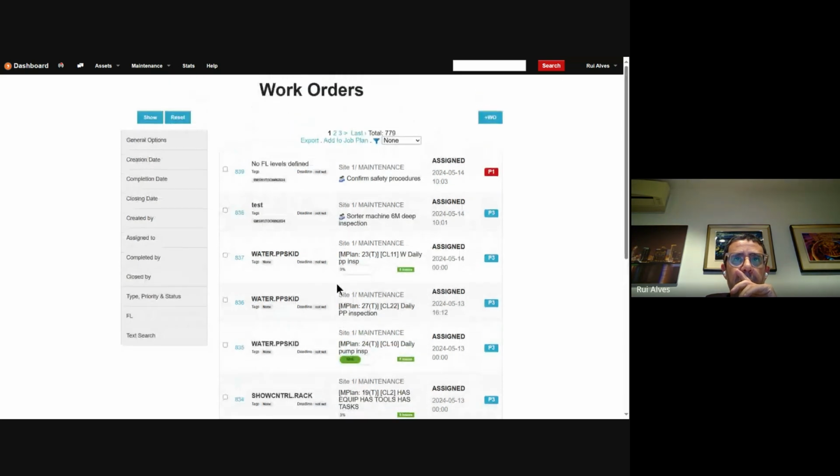And now you need to know some key things. As you go through your maintenance day to day, you will find some items that you can delay so that they happen during that shutdown, either because they're not very important, or because they are very important but the machines need to be kept running and you can't just have the machine stop right there and then work on it for hours.